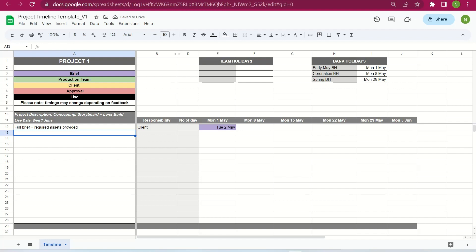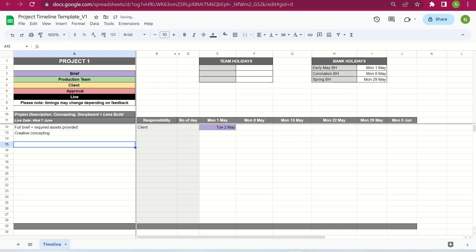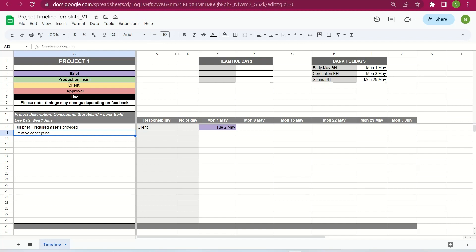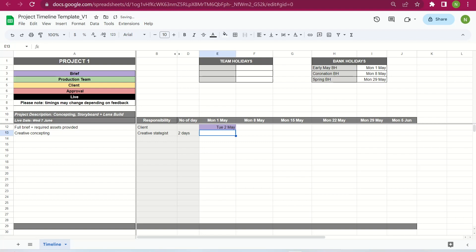The second task would be the creative concepts. Once the client has submitted the brief, we want to go back to them with some creative ideas, highlighting which direction they prefer for their brief. This would be done by the creative strategists. We can say it will take them two days to put this creative concepts deck together — that stays with us internally, so it's the green color code. That would be Thursday the 4th of May.